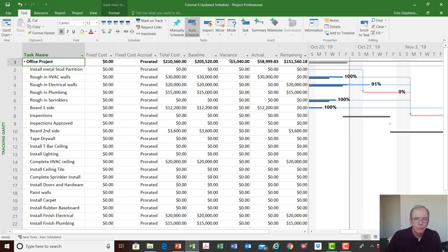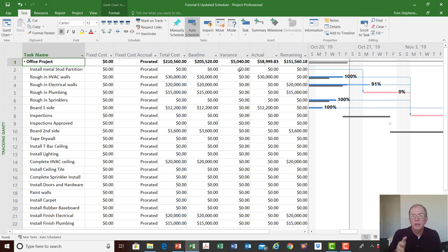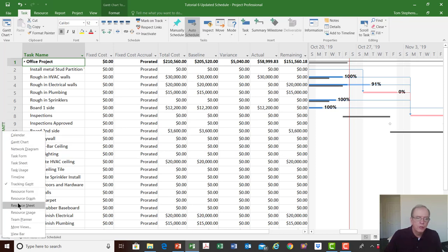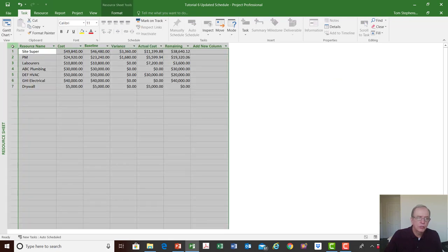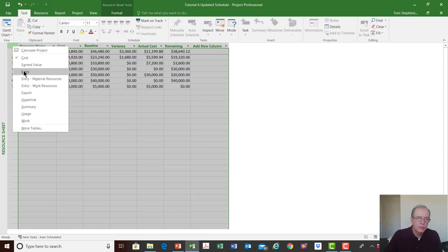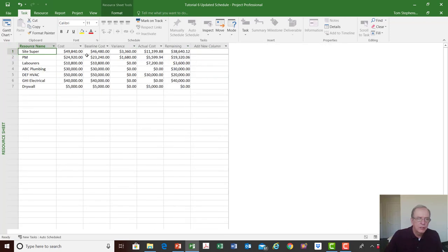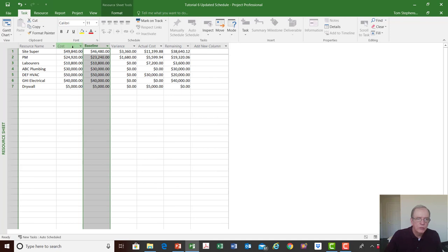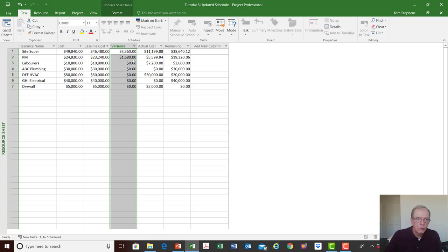If we were doing a cost-loaded schedule, we'd see the cost variances too. Right now it's $5,040 more, based on the project taking longer with variable resources like a site super or project manager. To see costs individually, go to the tracking Gantt, right-click, and go to the resource sheet in the cost view — you can see the baseline cost, current cost, and the variance.